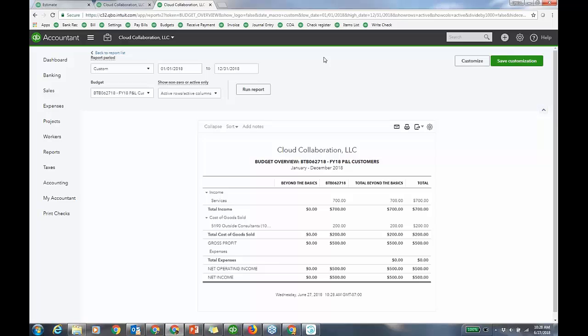So again, where the desktop wins with this, if your client doesn't have internet access, you're probably going to keep them on Pro anyway, is when they create the estimate, it automatically pre-fills the estimate to actual report. Now, there's no actual data yet because I haven't done any data entry against the job. But still, I have the template already. But with QBO Plus, the extra step or steps is to create the budget for that job. Now, it takes me about 5 minutes to do it, 10 minutes. But if I have 20 jobs that week, that's what I mean. How much time do you want to spend doing a workaround versus just seeing it in a third-party app right away? That's my point for the third-party apps, all right?